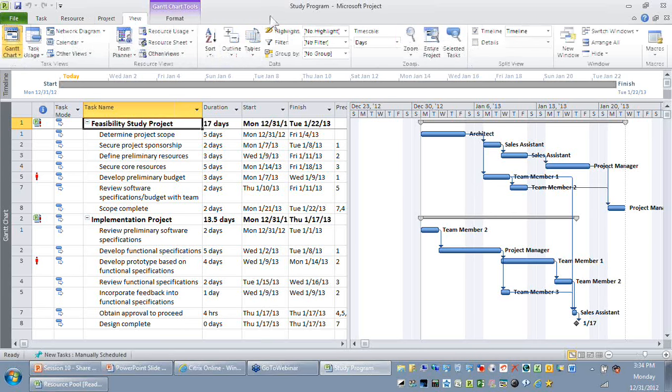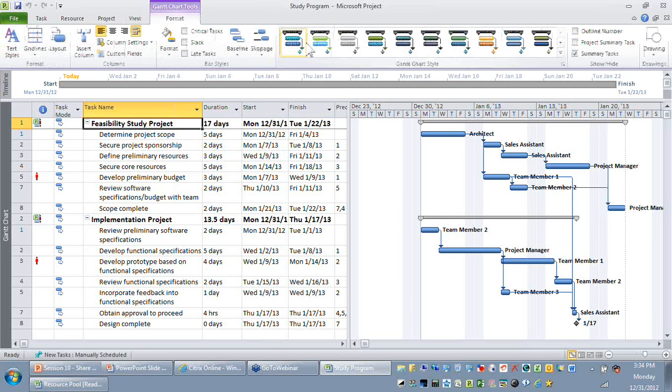So in this program, if you look at it, it looks as if you have only one critical path. You might say it is wrong, because for this project I have a different critical path, and for the first project I have a totally different critical path. But Microsoft Project tries to look at this as one single project rather than two different projects.